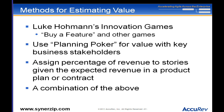Another approach I mentioned earlier: often there's a business plan where somebody's done a lot of research and says we believe this product over these years will bring in this amount of revenue. It may be wrong, but if you assume it's correct, you have just one assumption to work from. If your product is going to bring in three million dollars over three years, you can look at any particular feature and say what percentage of that value do I think this feature has.